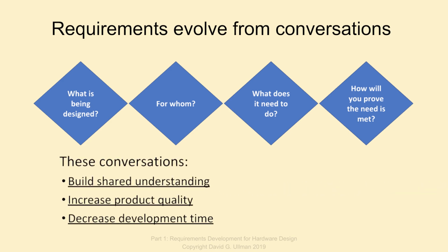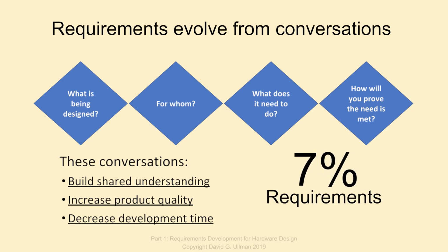First, these conversations build a shared understanding between the team and the customers. Second, experiments and industrial benchmarks have both shown that the quality of the final product is directly proportional to the time spent understanding the needs. Based on these benchmarks, about 7% of the total design effort should be devoted to requirements development. Finally, requirements development, if done well, decreases the overall design time as it reduces rework.